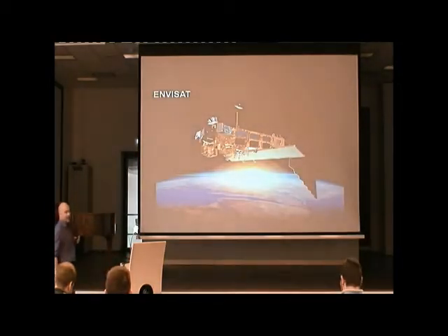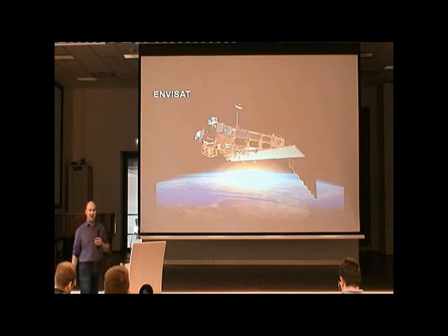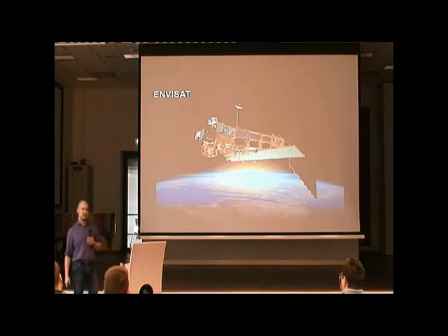This satellite, anybody recognize what kind of satellite it is? This satellite was almost the Wollmilchsau. This is Envisat. It had 10 payloads, a really complicated satellite, but it worked. It was actually possible, but it took like 2 billion to build, and 165 million only to launch, and probably half of the money was spent on bureaucracy and testing, because it was so complicated.